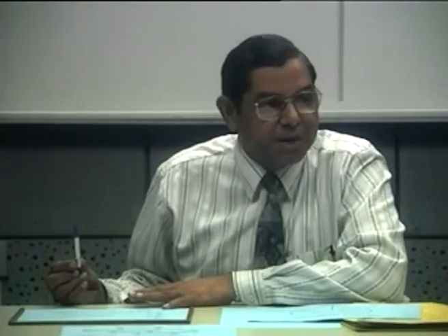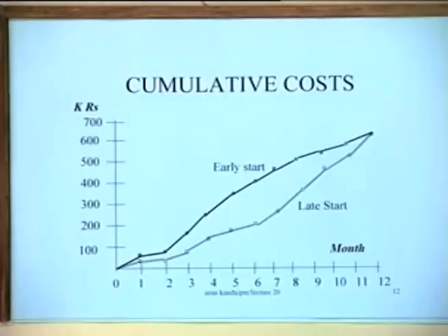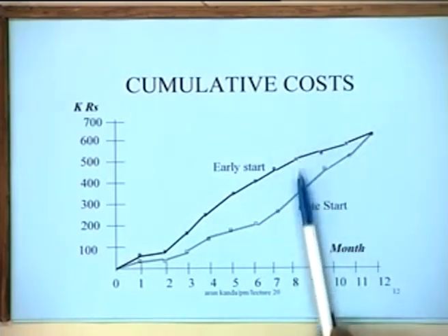So really speaking, the total NPV of expenditure is going to be lower when you are doing a late start schedule as compared to an early start schedule, which means that if you have to raise the capital through an equity loan, or from a loan from a bank, you will have to take a lesser loan if you follow a late start schedule, by virtue of this particular fact, right.